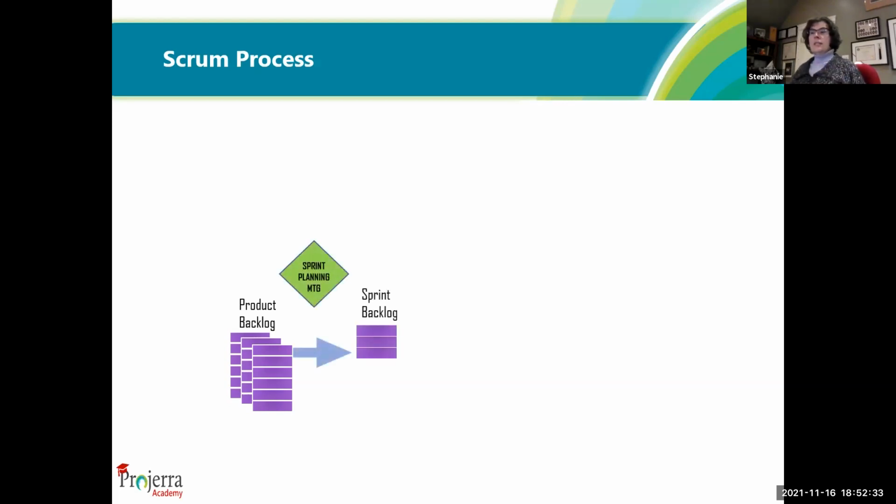And then the sprint team gets together and they say, I think we're going to do these 3 or 5 or 10 different features, 3 or 5 or 10 different user stories. I use those two interchangeably, features, user stories. Some people are very pedantic about the structure and the layout. Once again, some of the teams are very fussy about the way they describe what's in their sprint backlog. Other teams are not so fussy. But it is the responsibility of the Scrum team, of the development team, to pick and choose how much they take off of the backlog. They take it from the top down. They can't pick from the bottom, but they can choose how many they take off the list.